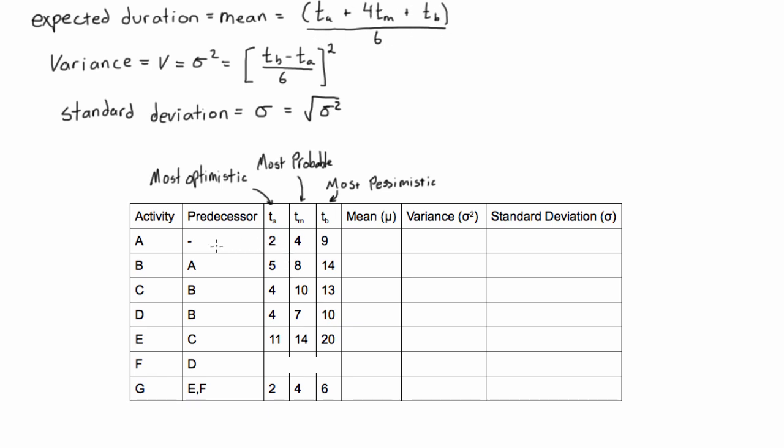So for the case for activity A, we would have 2, which is TA, plus 4 times TM, so 4 times 4. So here we can even do this in the case of activity A. Mean is TA, so we had 2 plus 4 times TM, so plus 4 times 4, plus TB, which is 9, and that is all divided by 6. So if you just punch that in your calculator, you'll get the mean is 4.5.